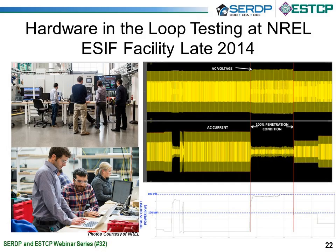So for us, this program kicked off roughly in 2012. The first two years of the program were essentially ironing out the microgrid system design, working that out with the base in terms of how the operations, the construction and the planning needed to progress. When we started the program, the energy storage system had only been demonstrated in a lab environment. They had their initial prototype of their energy cell operating, and they needed time to scale up the system. So the first two years were spent building up the 250 kilowatt unit from their lab-demonstrated system. That took a little bit of time.